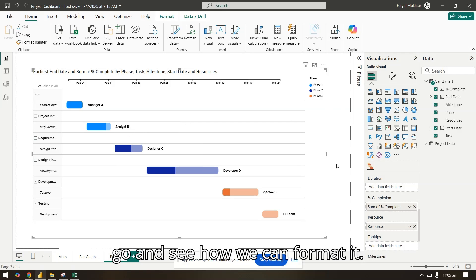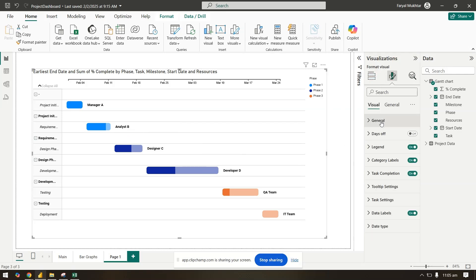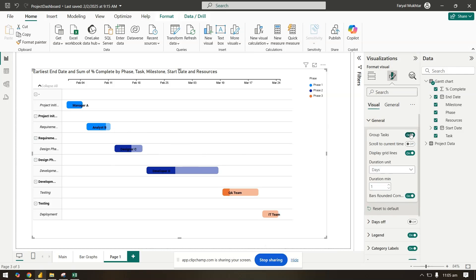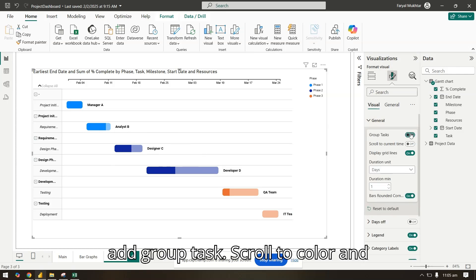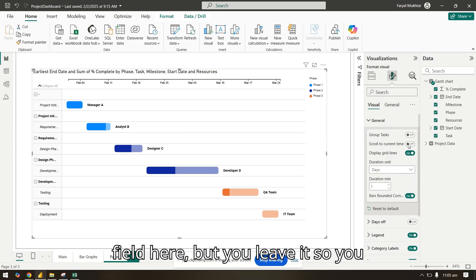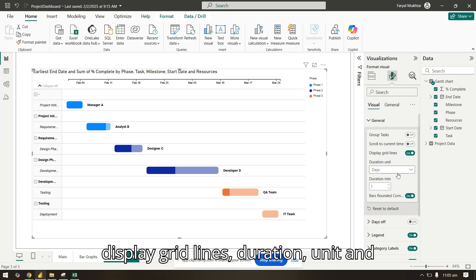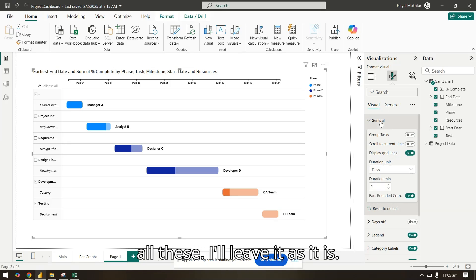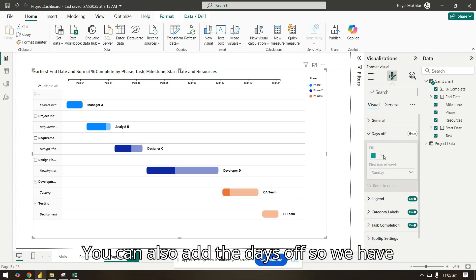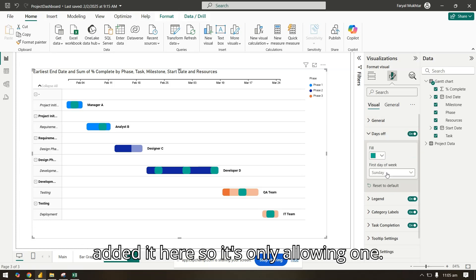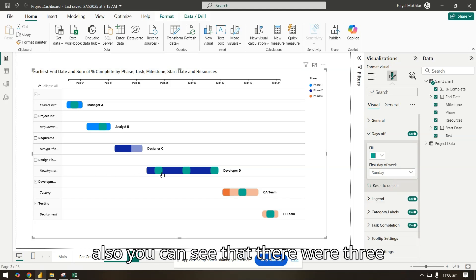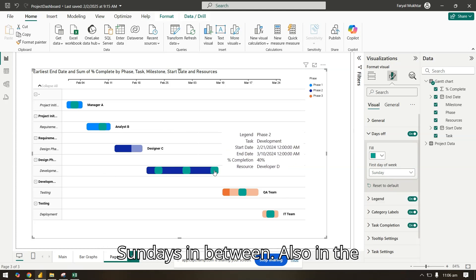Let's further go and see how we can format it. So in the generals, you can add group task, scroll to color and time if you have a very large field here. You can display grid lines, duration unit, and all these. I'll leave it as it is. You can also add the days off. So we have added it here. We will put it as Sunday. So now here you can see that there were three Sundays in between.